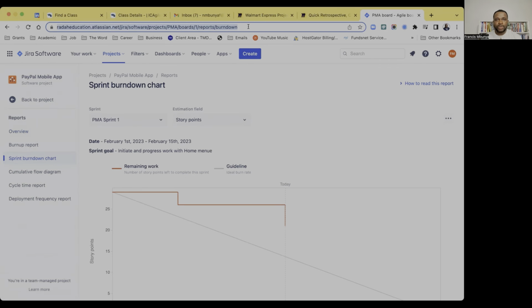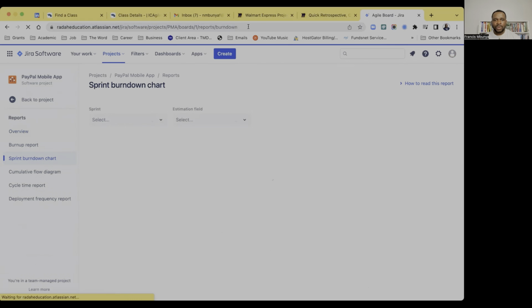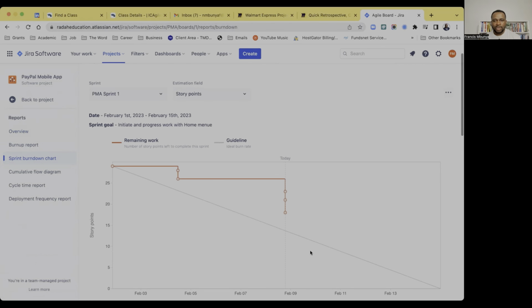This doesn't move. I'm just going to refresh the backlog and see. Okay, you see that we've completed another 5 story points, right? But whoa, it still shows that we are not. But then in most of the cases, you don't have to bother so much about this line. What you want to pay very close attention to is that if you can finish at least 80% before this last day, you're going to be in good shape. Right.